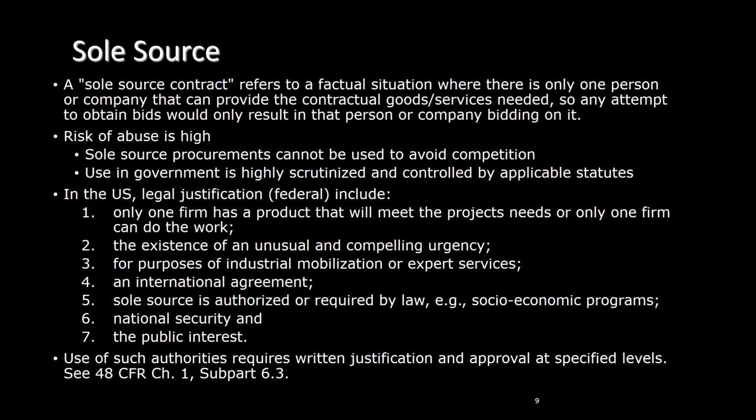We just covered 3 examples of competitive methods to contracting, namely RFIs, RFPs, and IFBs. Now we're going to talk about non-competitive methods, the first of which is a sole source contract. A sole source contract refers to a factual and verifiable situation where there is only one person or company that can provide the contractual goods and services needed. So any attempt to obtain bids would only result in that person or company bidding on it. Sole source contracts can be negotiated much more quickly than a typical competitive contract because only one vendor is considered.